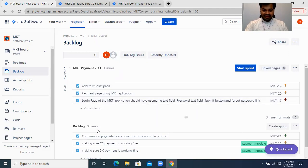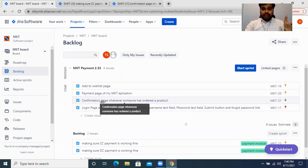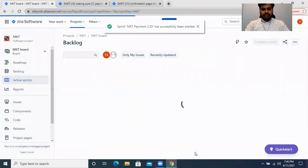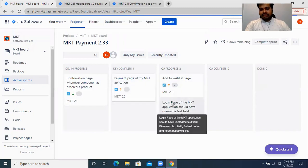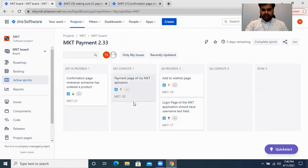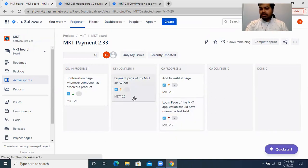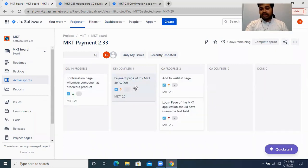Remember, those three tasks that you did not complete earlier are already in this new sprint. If you want to add more tasks, you can — any newly added task will start in the first state, which is 'Dev In Progress.' The moment you start this new sprint, it will again ask you to confirm. The three tasks will retain their states: the one task in 'Dev Complete' remains there, and the two tasks in 'QA In Progress' remain there.